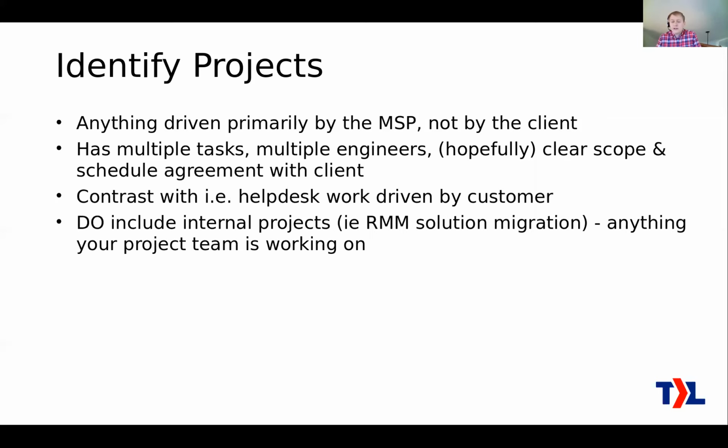So now here's the thing. You do want to include internal projects. Basically anything that your project engineers are working on, you need to be tracking, because you don't want to end up in the situation where you've only been tracking the customer projects because you get paid for them. They're easy to identify, but it turns out maybe a third of your engineers' time is taken up by a whole bunch of internal stuff. Some MSPs are really big on building out certain services. They offer these services as a product, but that takes a big amount of time sometimes. So that needs to be tracked. So don't forget about that.